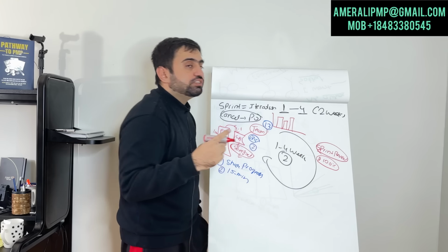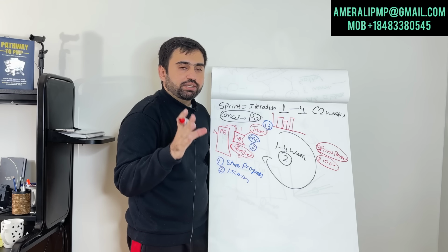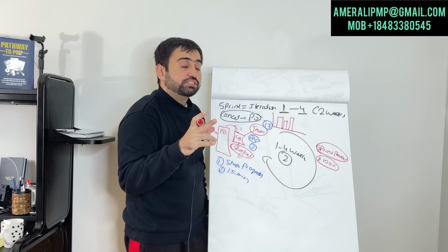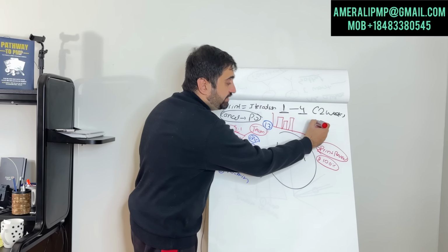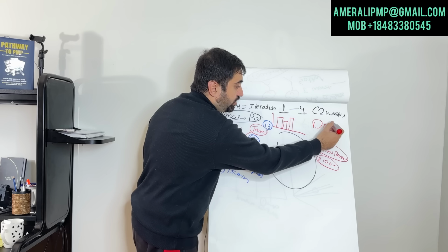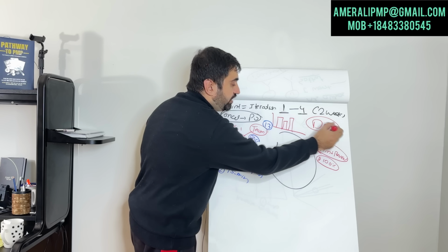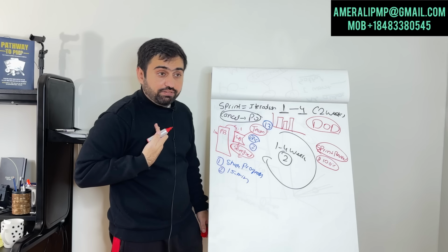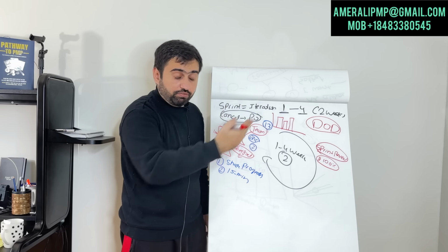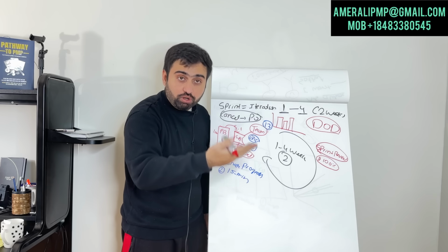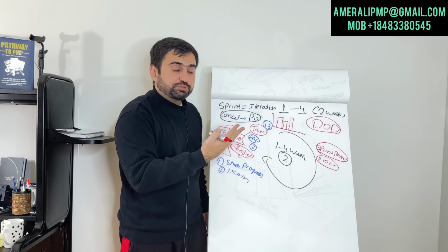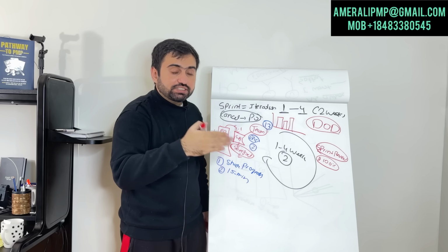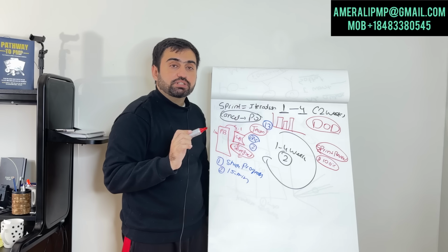This is an important concept. Agile does not believe in 99.9. 100% is a must thing for that. So 100% user story, how do I know? I have a checklist that is called definition of done. Definition of done is a checklist that I have based on the value the customer has given or product owner has given, because it's the job of product owner to tell you what to expect. So I have made the checklist that shows me the thing is 100% completed.